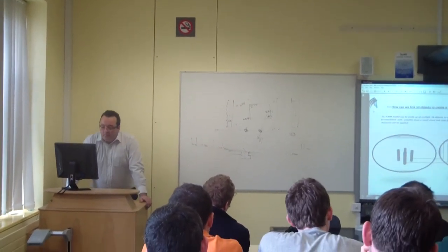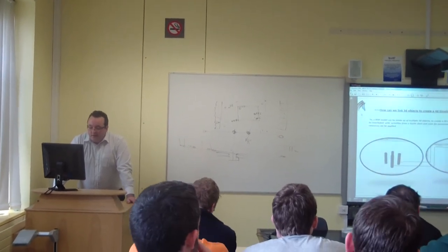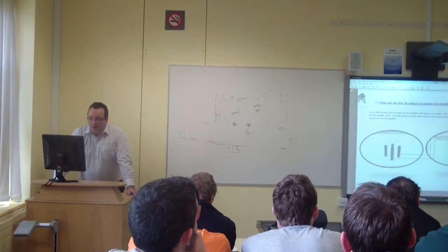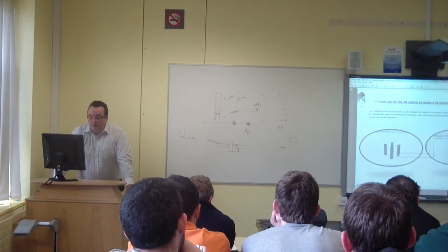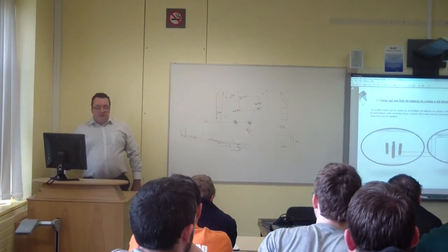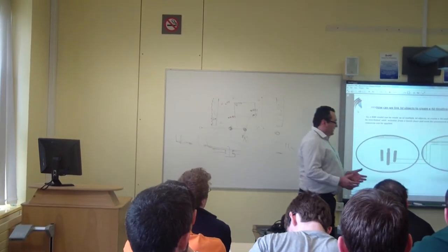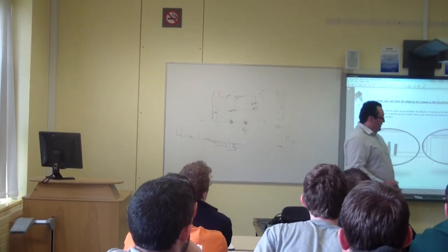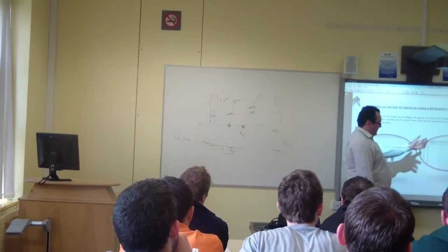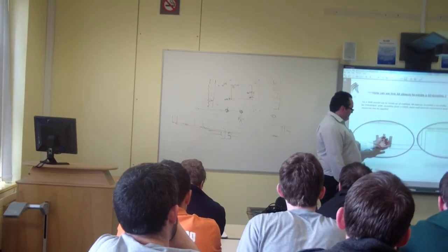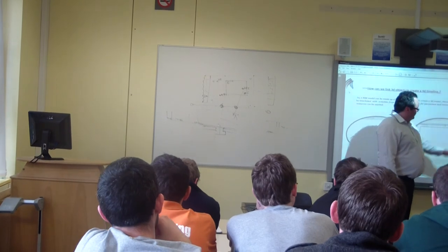So a BIM model can be made up of multiple 3D objects to create a 3D model. These can be interlinked with activities of a Gantt chart, and costs for permanent and consumable resources can be applied. Permanent: men, machinery. Consumable: materials. In 4D, it doesn't matter what software you look at, that's your Gantt chart. That could be a basement again. These are our four columns, those 3D objects, linked back to the Gantt chart.